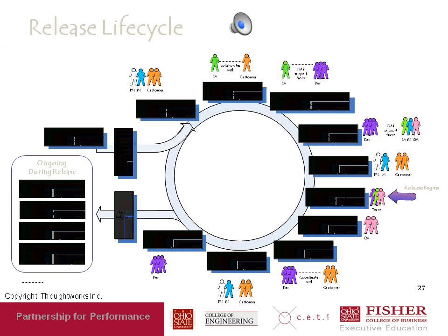And then the release is developed. To see how a release is developed, you have to look at the iteration lifecycle, because, like I said earlier, releases are composed of multiple iterations. Then finally, the release is put together for testing. The customer signs off on it, or decides that the release is not ready, and so there's a go or no go decision made. And if it's a go, then the release is deployed, and then a similar process is followed for the next release.